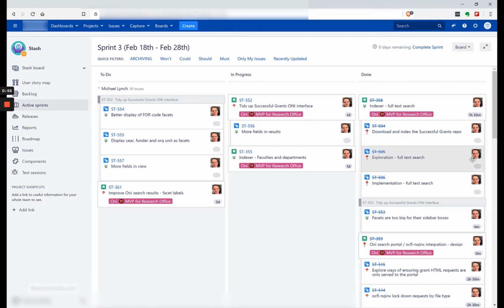And obviously, this is also something that is very typical. I wanted to show you this example because it's such a great example. It's real world, what happens in the real world and real world applications. Ideally, in Agile, if you went by the theory, you would have estimated the time it would take you to execute all the different user stories. And generally, in Agile or in Scrum, we don't normally and typically estimate in time, in hours, but most of the time we estimate in story points.